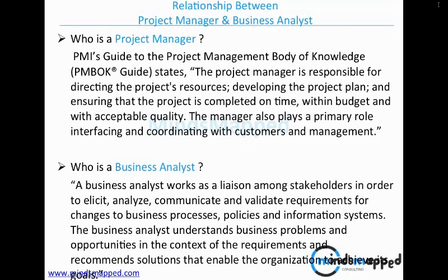And that is one of the reasons why the BA role started. People started taking the BA role as a serious thing, because if your requirements are wrong, your design will be wrong, your development will be wrong, your testing will be wrong, and then when you reach the UAT stage, the user would say that you got my requirements wrong, and this is not what I need, right? And this is what has happened with major projects. I have seen a project being scrapped after 5 months of design, development, testing activity, going to zero, sunk cost, absolute zero. No output could be used by the user because the requirements were understood incorrectly and they were developed. The requirements were not clear from the BA side, right?